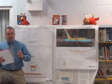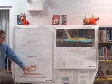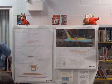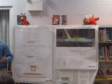So we eventually did, looking at cost, looking at construction sequencing and time, settle on the four-side box culvert. It's a 12-foot span by 8-foot rise. Again, it's submerged. It's set 2 feet below grade. It ends up being a 6-foot rise, so 72 square foot opening.